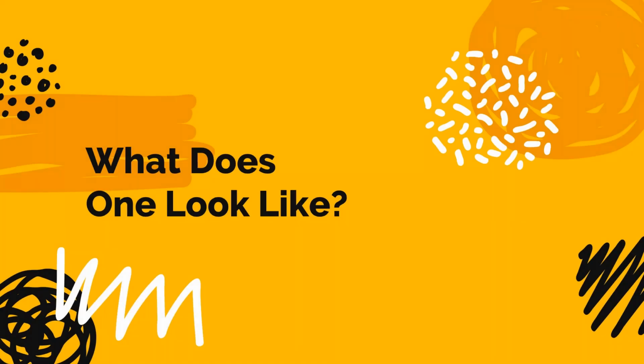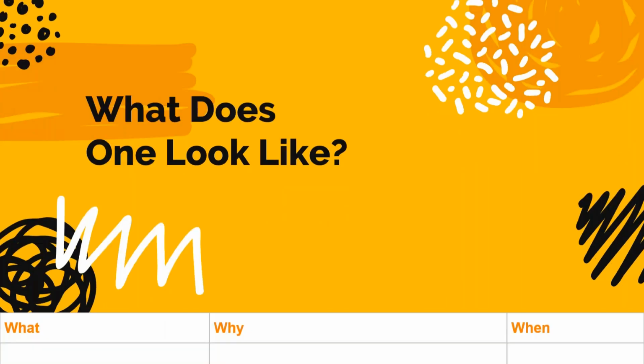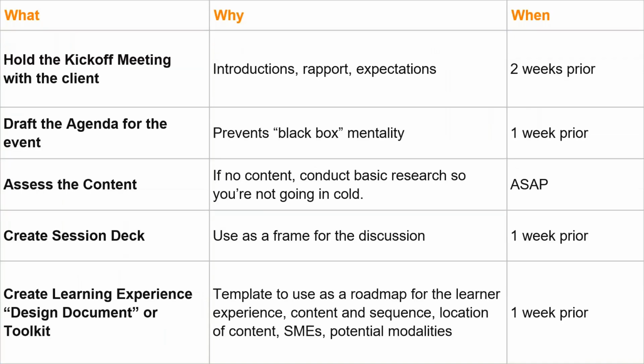So what does one look like? I'm going to talk through what these experiences actually look like when we go into a client and lead these design sessions. So typically, and this is just a high level peek at what the planning and the different milestones are, right? The first thing is the kickoff meeting with the client, typically a couple weeks before, designed really to develop rapport, to start getting a feel for who the attendees are, and what their point of view is, because we need to know that going in.